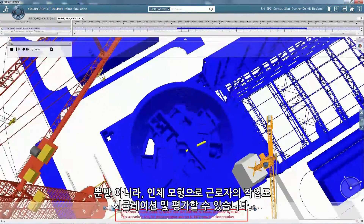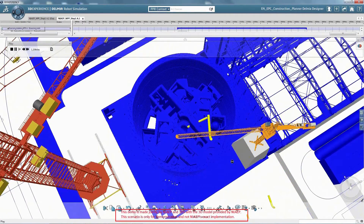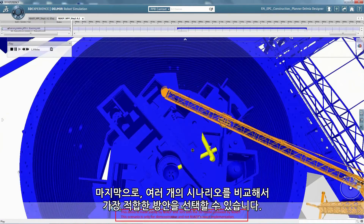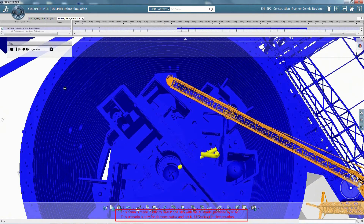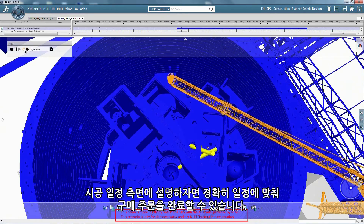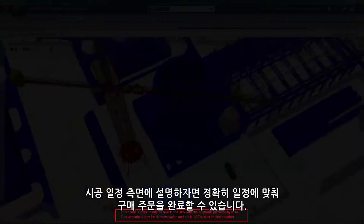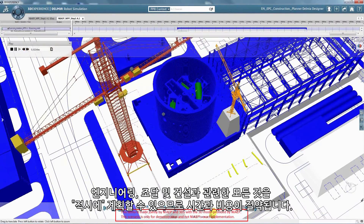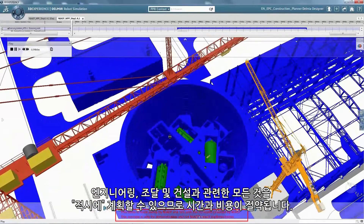Workers' tasks can also be simulated and evaluated with mannequins. Finally, you can compare multiple scenarios and choose the most optimized alternative. From the construction schedule perspective, purchase orders can be done with precise timing. Everything can be planned just in time across engineering, procurement and construction, resulting in time and cost savings.